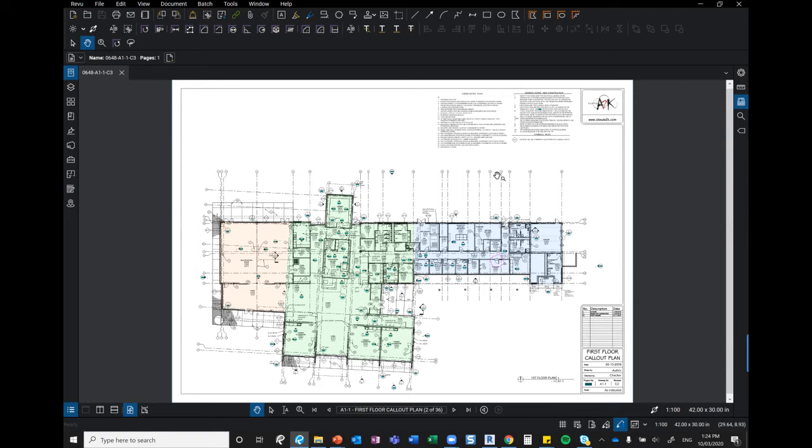So what's important here in a Studio session is that 500 people at once can mark up drawings. It's quite a lot of people, but the thing is, everyone can actually be doing the markups. It's not check in and check out. So with that process, they're able to make inquiries, or an HVAC specialist can start pricing this, but they might have an issue for the person that looks after the structural or the pour sequencing and so forth, and can start to ask each other questions inside the session.